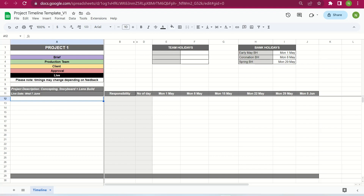Now let's get started with the task list — this is the column where we add the full task list to create this lens. One great tip: if you're new to a role or new to a particular type of project, ask your team for a previous project template of that same project type. If a senior PM has worked on a lens build before, ask them to share the timeline — that way you already have an idea of the exact tasks and don't have to create it from scratch, making the process much more seamless.